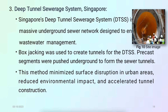The next case study is the Deep Tunnel Sewerage System (DTSS) in Singapore — a massive underground sewer network designed to improve wastewater management. Box jacking was used to create tunnels for the DTSS; precast segments were pushed underground to form the sewer tunnels. This method minimizes surface disruption in urban areas, reduces environmental impact, and accelerated tunnel construction.